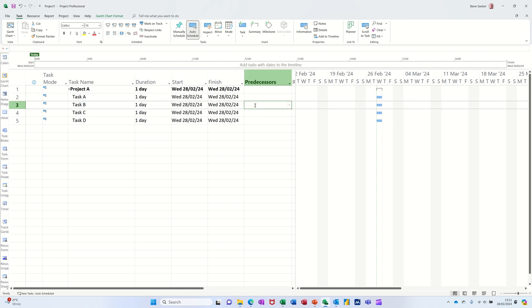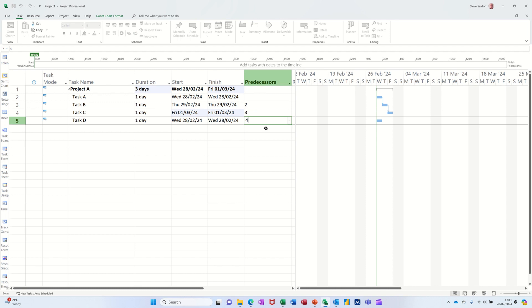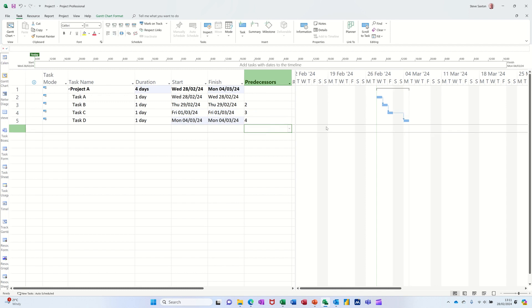I'm just going to put the predecessor task number in the predecessor column — so in this case two, three, four. You get the little steps coming up on the Gantt chart on the right.